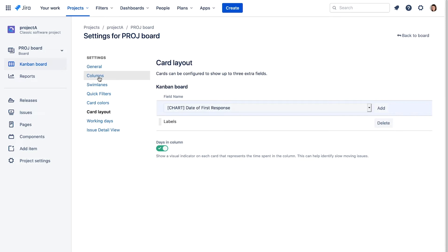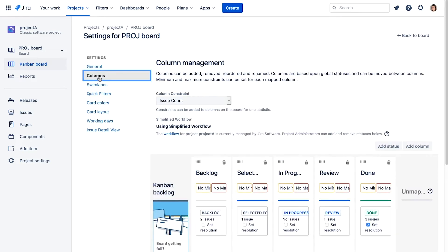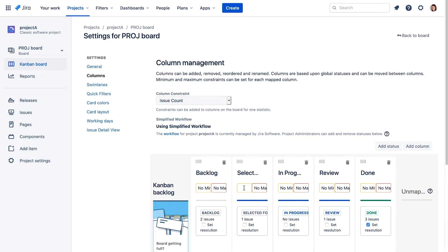We can now specify minimum or maximum work in progress limits for the board columns. Let's specify a minimum limit of two. This means there should always be at least two issues in this column.